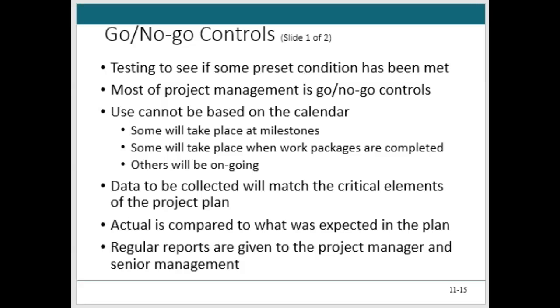So we're comparing these baselines, the plan, budget, and schedule. Those are control documents, our project baselines, to milestones as natural checkpoints, right? In quality management, we might also do attribute sampling. It's a simple yes or no. Does it meet the requirements for which it was being built, right? We could have a measurement for the quality degree, right? If it's not yes or no, right? What does it take to meet the requirements?